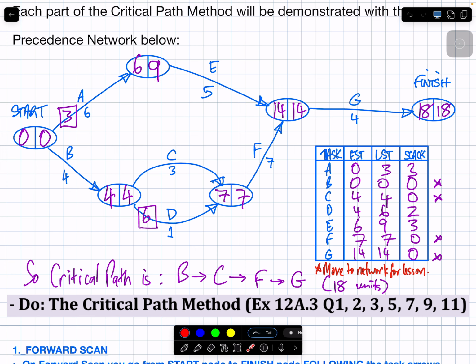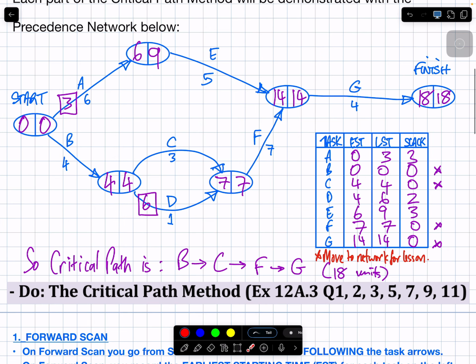Okay? Why can I delay this by 1? No, 2. Yeah, why can I delay this by 2? What's the slack time here? 2. Why can I delay it by 2? Because it takes 1 minute and the other option takes 3. So I can slack it off for 2 minutes to keep the same time.